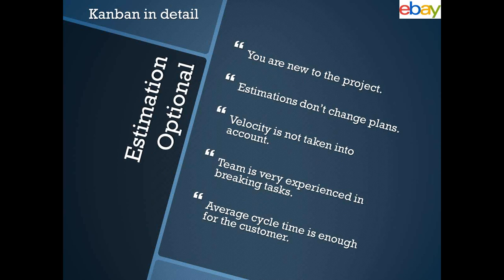Another strategy in Kanban is that estimation is optional. There are many cases in software where you have to estimate and give a release timeline for new features. You can opt for estimation being optional when you are new to the project and can't estimate properly, when your estimations don't change the plan or aren't critical at a particular time, when you don't need to measure velocity, when the team is experienced enough to know they can complete any task in one or two days, and when the average cycle time is sufficient for the customer with no hard deadlines.